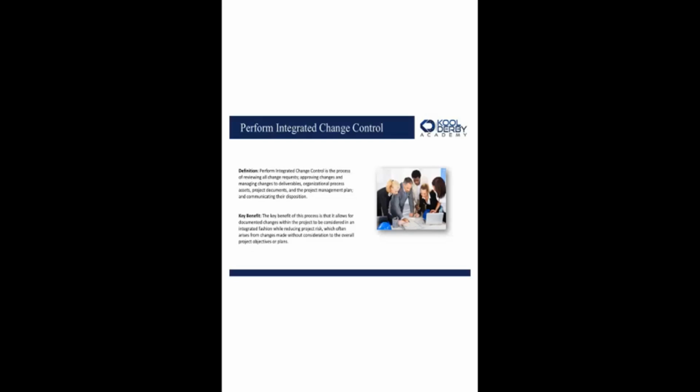So there has to be a formal way by which to manage changes. One other thing that I discovered while doing some reading over the weekend is that there's something called a pre-change. I hadn't really thought about it, but a pre-change is a change that is submitted to the change control board but has not been reviewed as of yet. Let me repeat that. A pre-change, in case it comes up on the exam, is a change that has been submitted to the change control board but has yet to be reviewed by that body.